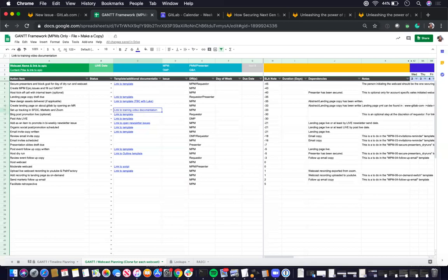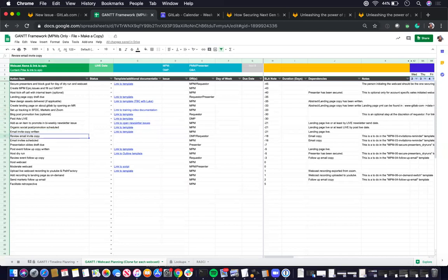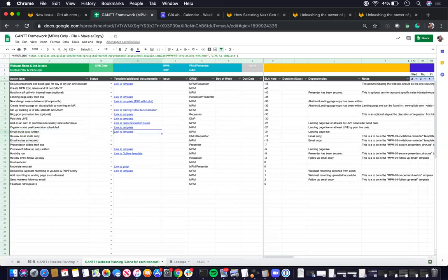And one thing to note, for example, there is usually like there are some tasks that share the same issue templates. So for example, email invite copywritten and email invite scheduled share the MPM-03 invitation reminder template.